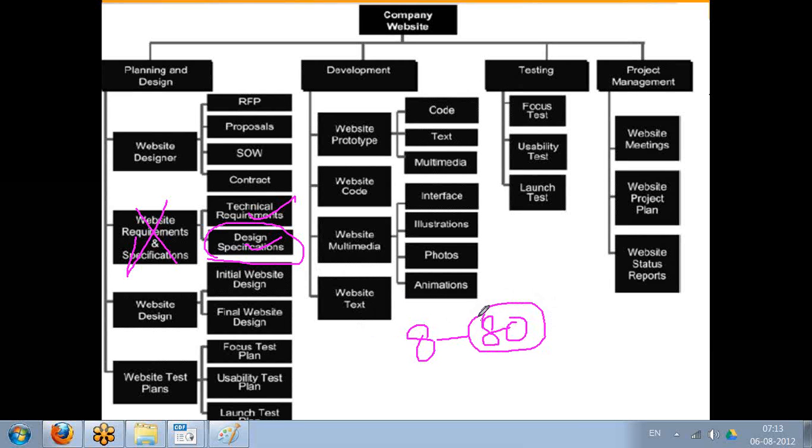So when I say I decompose the work package is towards 8 hours, means at least once in a day you will go and see the status of it. Okay, so that is the idea.